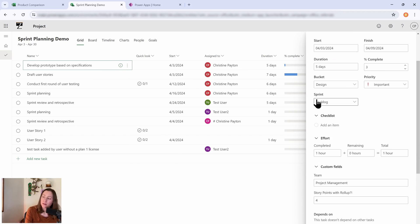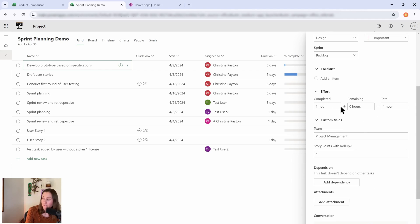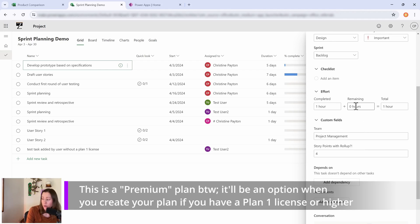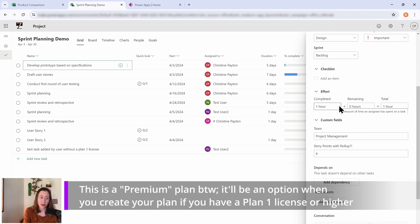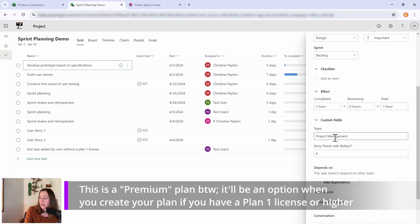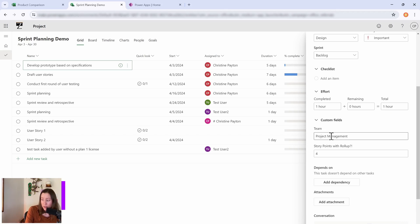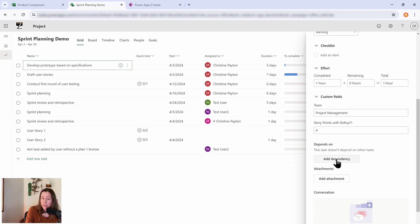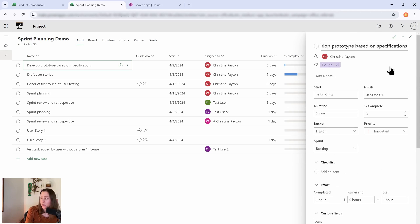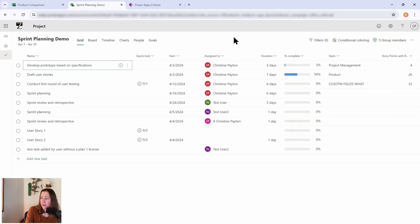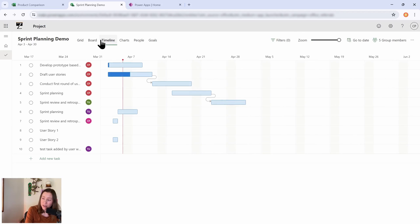Effort, so you can track how many hours something took and how many hours are estimated, how many are remaining in a project. You get custom fields, so I've added these two here. You get dependencies, so these dependencies are going to be what shows up in your Gantt chart, which they call a timeline.